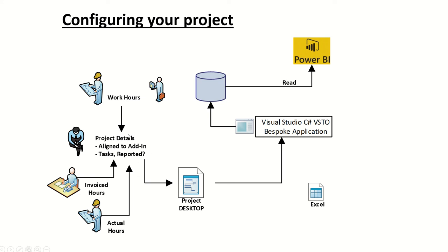So when we've got our project up and running, straight away the add-in will work. It's just that you might get too much information if you've not configured it. And we want to be precise with our information. So then our engineers, once we're up and running, in this environment, will tell the project manager the actual hours worked, and the project manager will type into the project desktop in this instance.